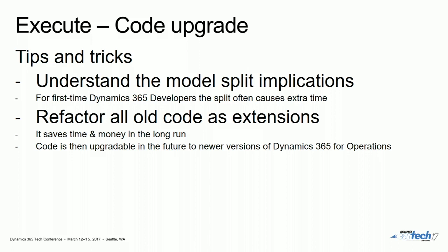So, if you're upgrading from AX 2012 and coming to Dynamics 365 for operations, it makes sense to do the refactoring at that point. Because you're already doing this enormous test pass and all the rest of it, you're getting more value out of the surrounding tasks. Yes, it's extra dev hours, but it's not extra test hours, it's the same test hours because you have to retest everything anyway. You're realizing extra value on the surrounding tasks aside from coding.